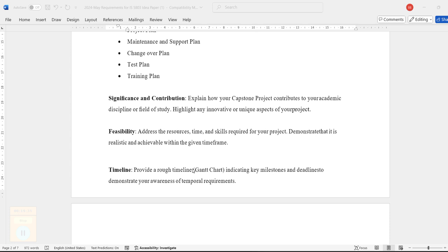Discuss whether financial resources are available, technology resources are available, and people and people skills are available, and whether it is possible to get them from the market. For example, I want to create this project in Java, within a deadline of 30 days, and I have a budget of 1 lakh. Based on that, you should say that Java skills and Java professionals can be found in the market, so there's a possibility that it can be implemented.